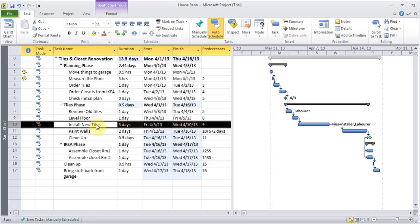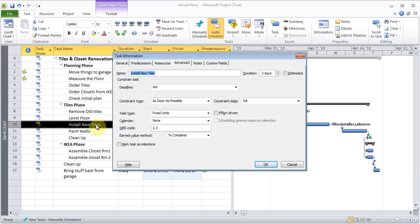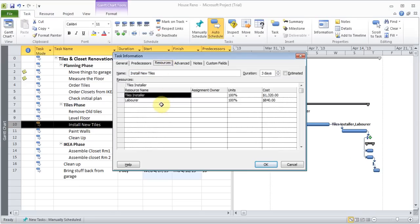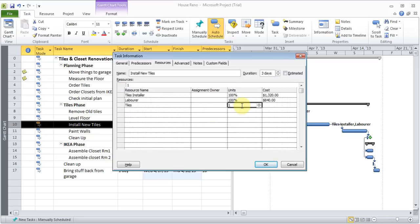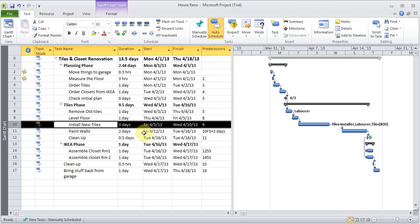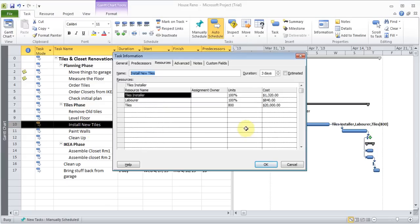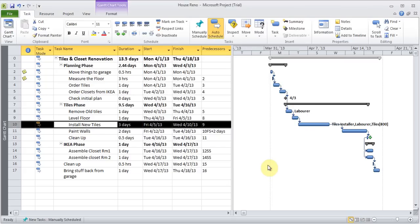I'll double click on it. And I want to under resources. I want to add the tiles. So and I can say, you know what. I'm going to put away 800 tiles. Click OK. I'll double click on it. And there's the tiles price. $20,000. And these are the other things. So now you can start seeing those information coming up in the Gantt chart.